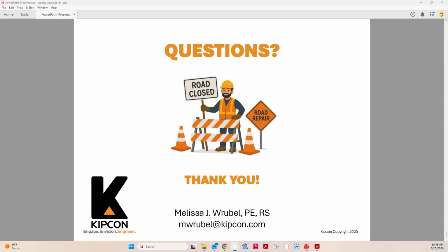When they mid-mill, you can't decide to not finish the project. You have to finish that phase of the project. You don't want to leave work undone. But yes, there are often times where you will reach a breaking point in a project where you need to say, we need to take a break on this and reevaluate what we're doing because this is costly or potentially costly.